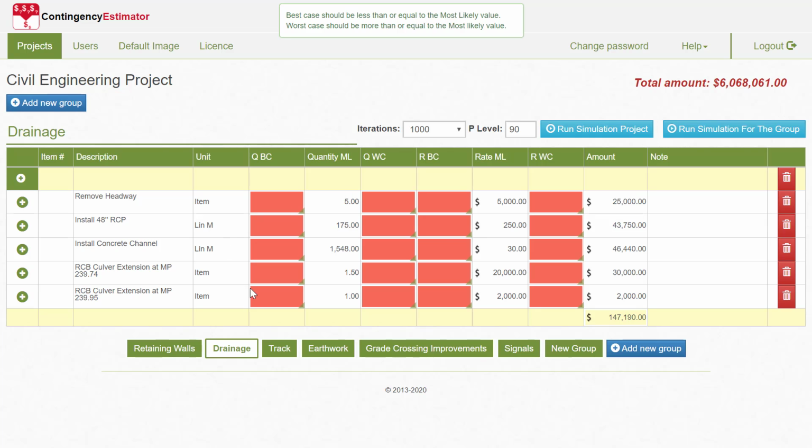Now, when undertaking a review of these numbers, it's important that it's a workshop environment and you get a cross-section of ideas. Obviously, the estimator would be a participant, but designer, project manager, client is the normal group. It's a relatively small workshop.